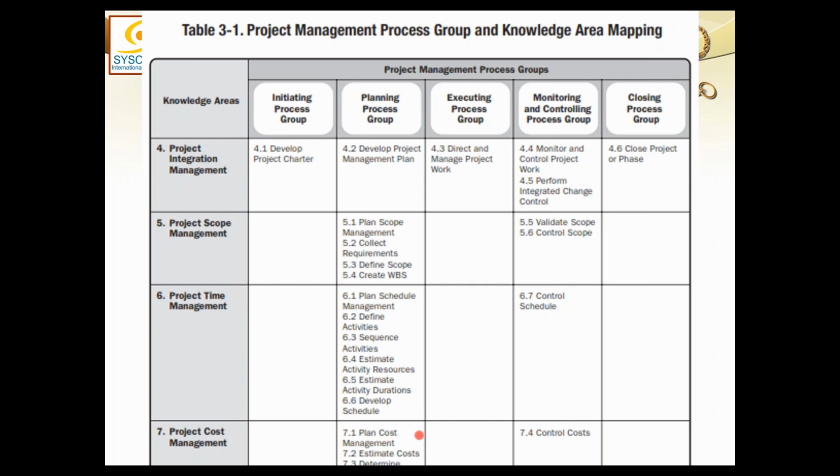Because if you don't do that, the plan will keep changing all the time and you would not know which version to implement. Therefore, you must put your foot down at some stage and say, this is the final version of my plan and this is what I am going to execute. So this is the frozen version, or we can call it a baseline version.